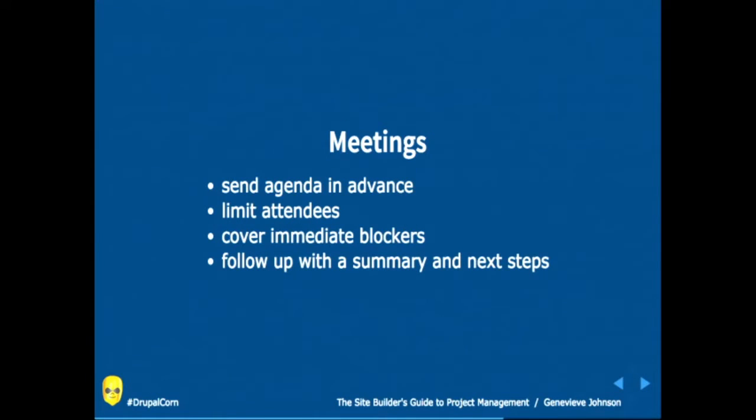It's really easy for everyone who's involved with a project to want to come to a meeting, especially if you're showing something off. The clients, everyone in a whole department will want to come see it, which is great that they're really excited, but when it comes time to making decisions, you really want to make sure that your decision makers are there, that they're prepared to make decisions, and that it's not going to turn into this meeting where they're like, okay, well, that's great, but now let me take this back to my department and shop it around to 50 people to get feedback on the color of blanks. So making sure you have the right people in the room who are ready to make decisions will keep everything moving.